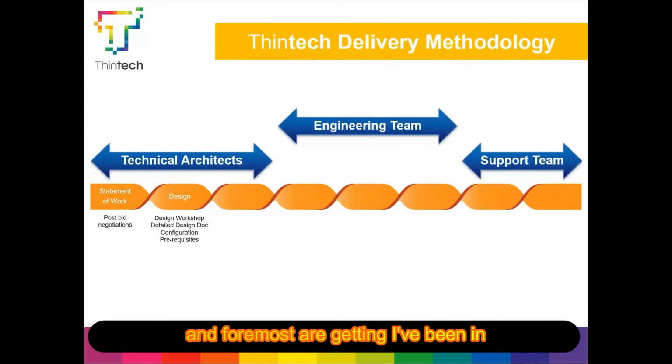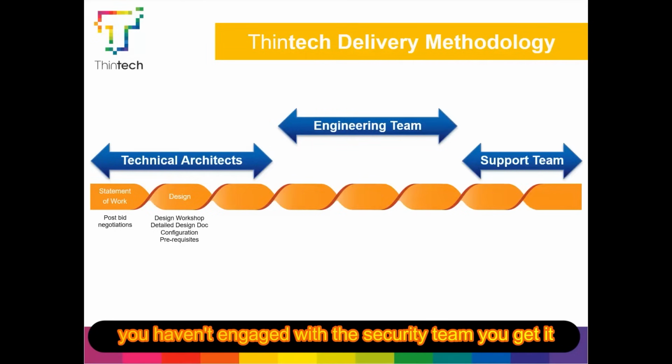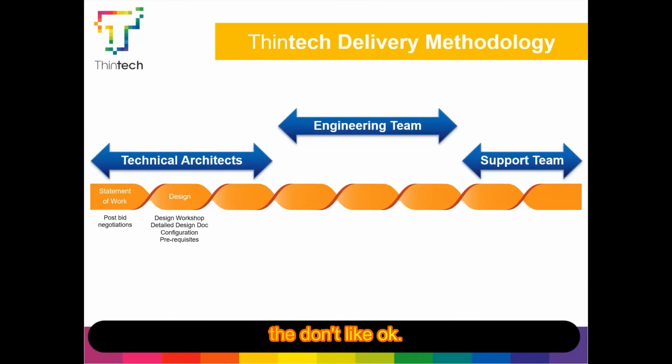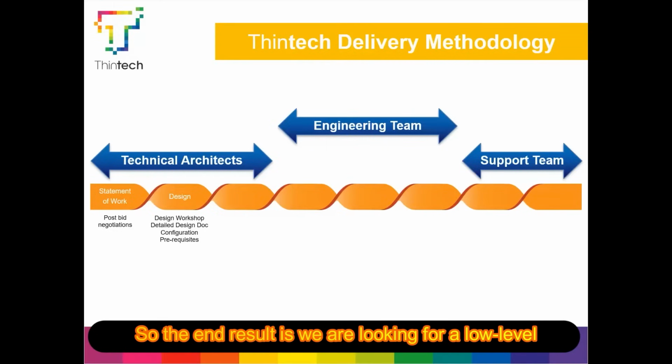impacted. First and foremost, I've been in situations where you go along with a design, you haven't engaged the security team, you get it all approved, and then it gets vetoed by the security team because there's something in it they don't like. Okay, that is the fault of the architect, because he has not engaged the security team early on in the process. So the end result is we were looking for a low-level detailed design document, again signed off by all key stakeholders.